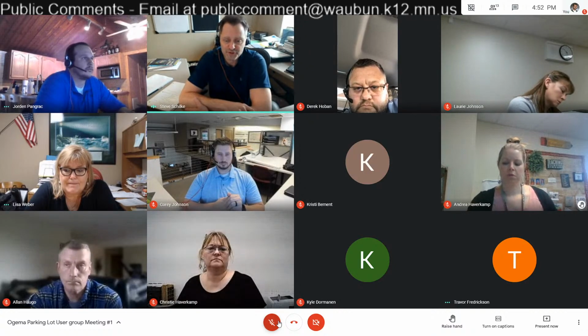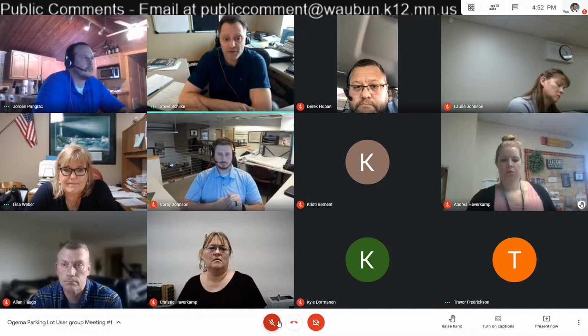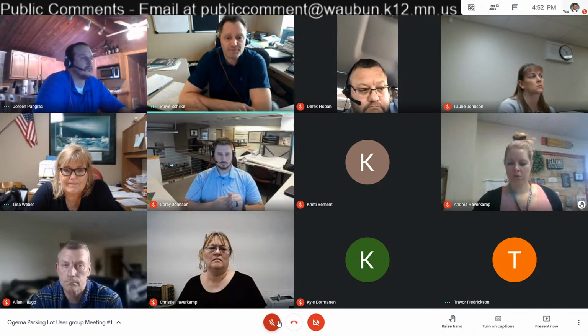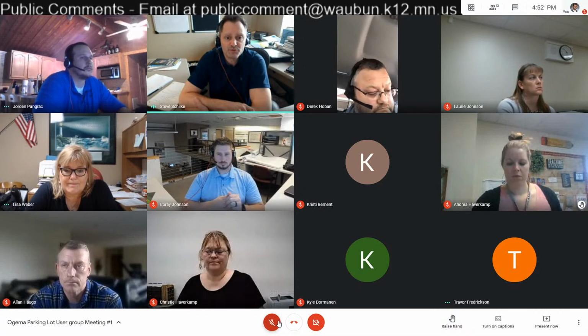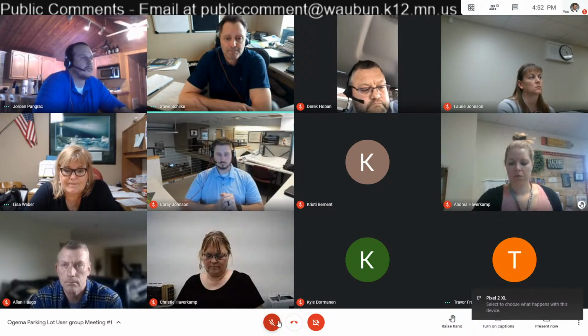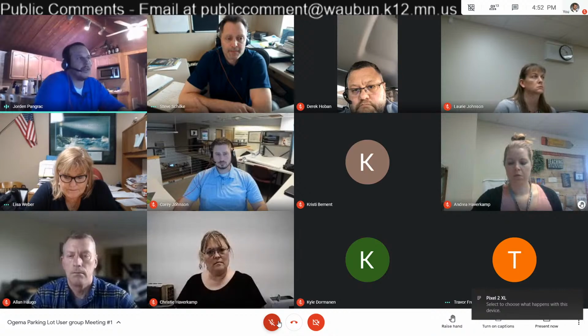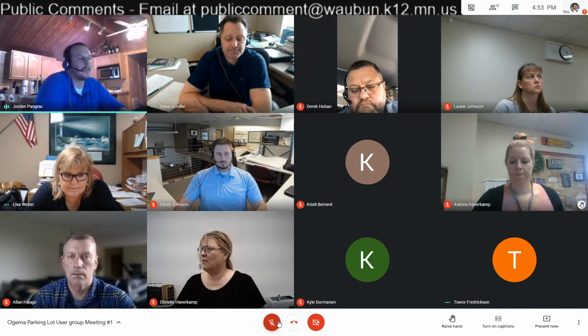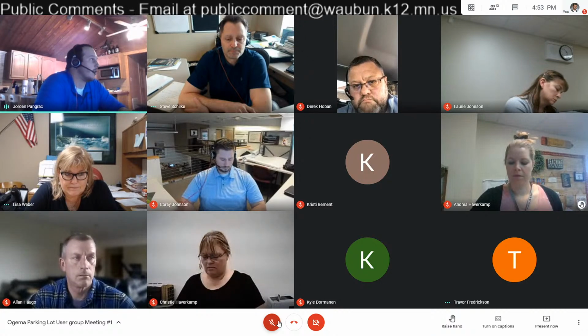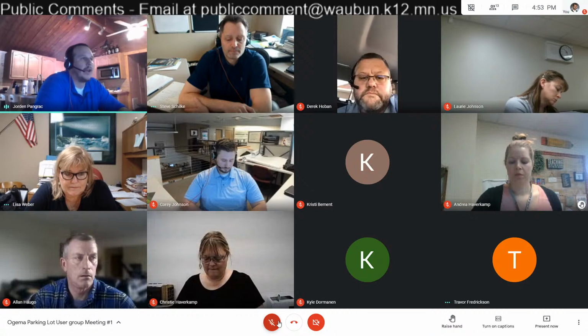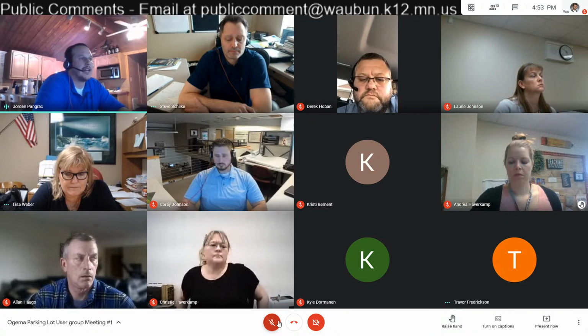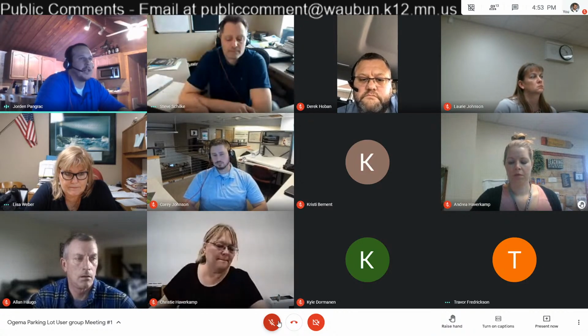But first thing we'll do is see how close we are to that 1 acre, and then go from there. Come up with some options if we need to once we find out. And just tuning back to what I was saying before with the DD presentation, that'll be a formal presentation. We'll also include a budget for what the value of the work is that we see at that point. So that will also be kind of a deciding factor on some of our decisions as we move down the road.